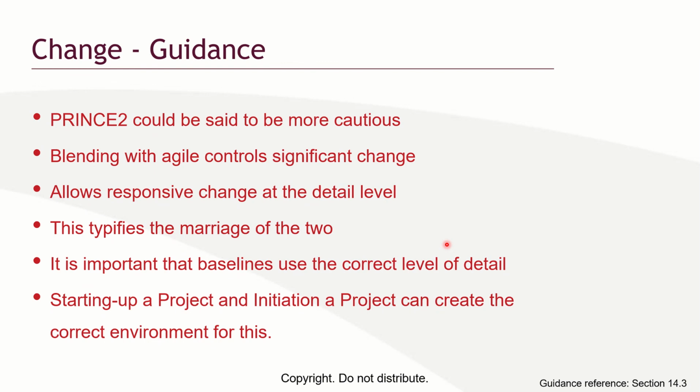Okay, this is a three-story building plan. Is there a possibility of making it five? Is there a possibility of making it 10, 8? All those questions should be asked so that even if the person says, well, we might look at it in the next 5 years, then you will make sure that the foundation is done such that there is room to create another foundation by the side that will not affect the building.